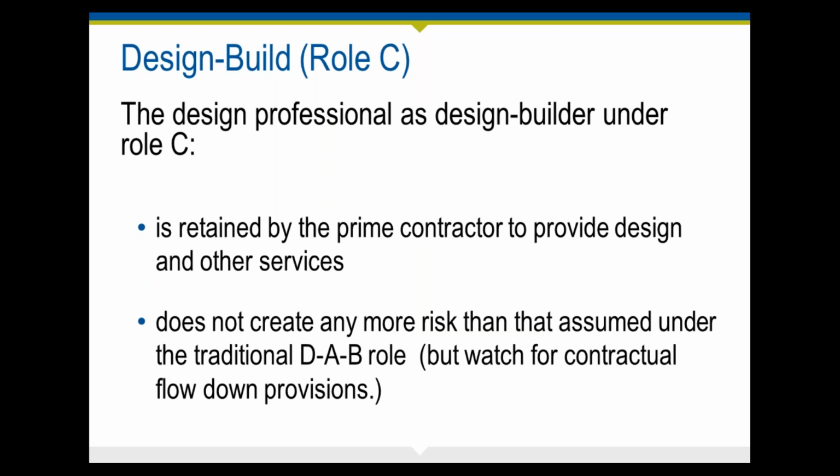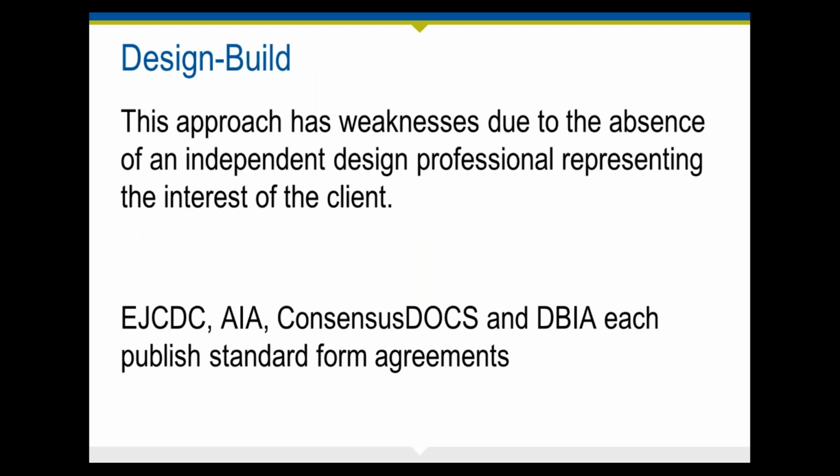So we'll touch on that again in this next slide, because in none of the three design build roles we just discussed does the design firm act as a representative of the client, of the owner. This can be a weakness because the client doesn't have someone to independently determine if the contractor is doing the job well or as promised. And this could result in substandard work or in excessive payments being made early in the project, or slow payments or non-payments of subcontractors.